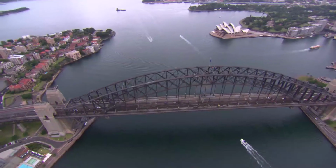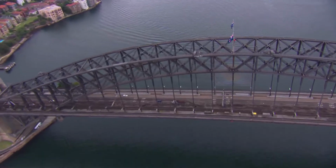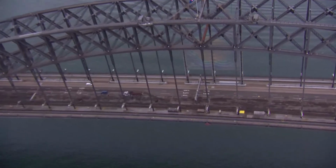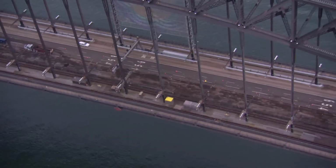Well, we're actually going pretty well, and we got caught out about 9:30. We had a storm, and it was quite unexpected. We've been in constant contact with the Bureau of Meteorology, and they were indicating to us that we were not going to have any real issues till about midnight. So we had planned to finish off that section on the southern end, and we would have been in a great position today to complete the asphalt on program.